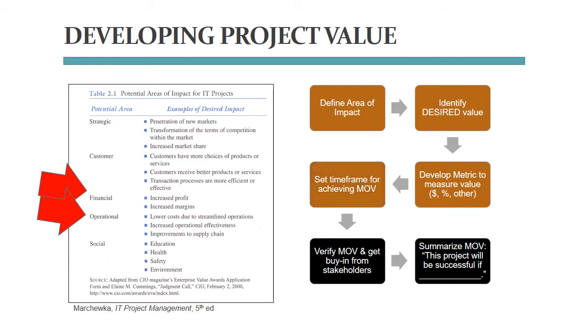The next step is for leadership to determine whether the value, the target, and the time frame are actually doable. So they will consult with the most experienced senior members of the portfolio team, industry experts who know the market as well as how the project delivery teams work. This usually culminates in a value statement called the MOV, or Measurable Organizational Value, that you're seeing here. For example, increase awareness for healthy living by having 250 new subscribers sign up for a weekly newsletter within 6 months.